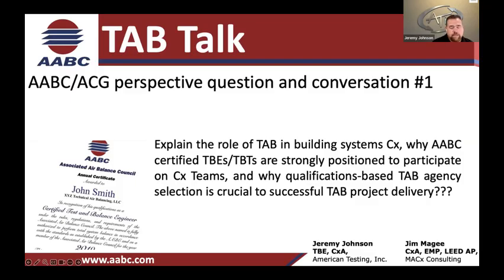Ideally, we would love to have the TAB contractors, the TAB agencies, being owner procured, the commissioning agency owner procured as well. That allows for really seamless open communications. Hate to say it, but when we go through traditional contracting, sometimes stuff can be slowed down, right? And the process and how it gets to where it needs to go.